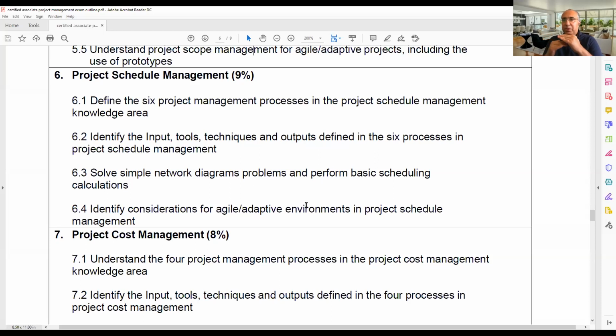A lot of them may be done in parallel, others have to be done after the other. So it's hard to understand how long the project will take until you make an activity network diagram. You can also add crashing: you can crash the activities. You can add more people, more resources, or you can do something in parallel. So that's a thing to remember.